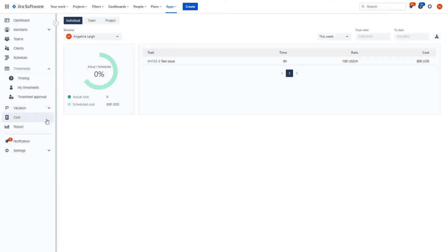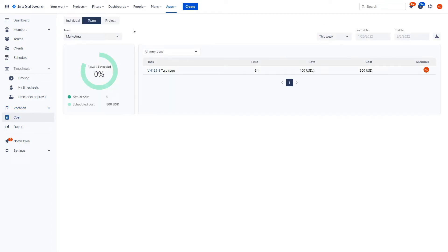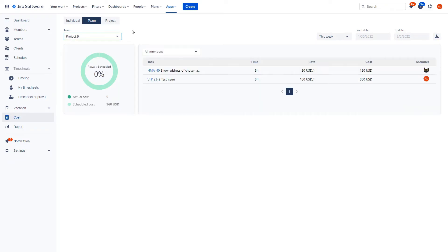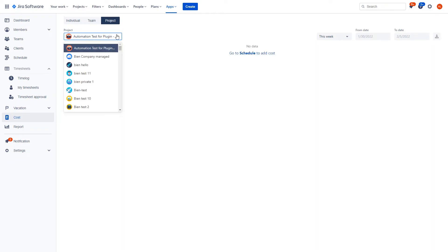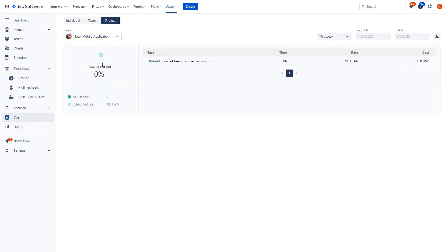Manage costs for individuals, teams, projects and clients, as costs are calculated based on rates set and time scheduled for tasks.